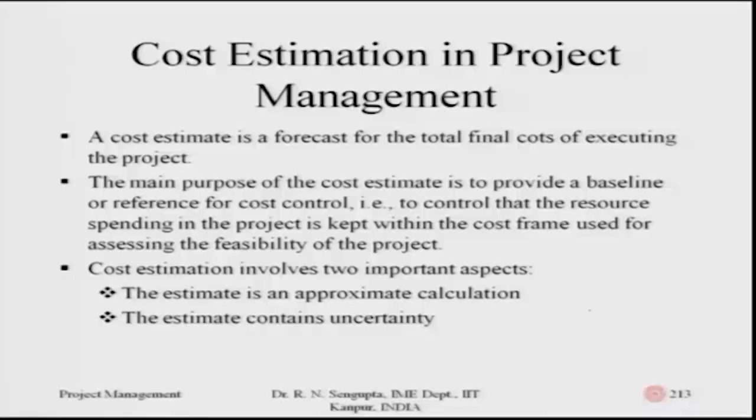Cost estimation involves two important aspects. One is that the estimation is an approximate calculation only, it does not give you exact calculations. For example, the risk-free interest rate is changing, and it can change depending on the government securities. Or the price of petroleum, crude oil, is changing, and consider your product is heavily based on the price of petroleum. Or consider labor cost is increasing, or some political situation is changing such that the overall cost is increasing, or environmental costs are to be brought into the picture. As these change, they keep changing the overall project cost. So, they are just tentative results based on which you will proceed to the final stage of the project.